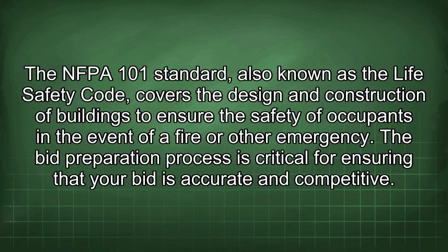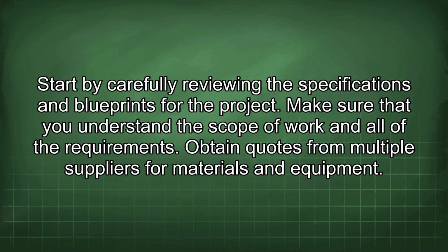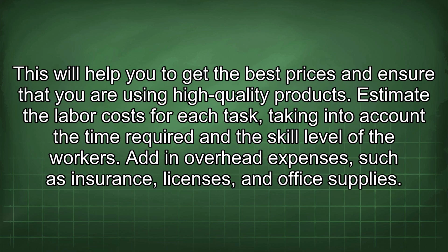The bid preparation process is critical for ensuring that your bid is accurate and competitive. Start by carefully reviewing the specifications and blueprints for the project. Make sure that you understand the scope of work and all of the requirements. Obtain quotes from multiple suppliers for materials and equipment. This will help you to get the best prices and ensure that you are using high-quality products.